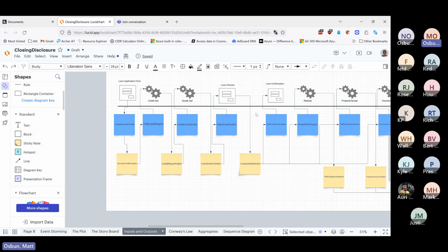So what you're talking about is a small piece of a whole. When you have vertical slicing, and going back to my last talk, highly cohesive software, then you also have highly granular software, which by its name implies small software. It's easier to estimate the work to be done on a small piece of software. It's borderline impossible to estimate accurately the work to do for an application.